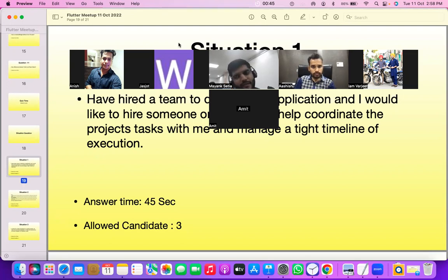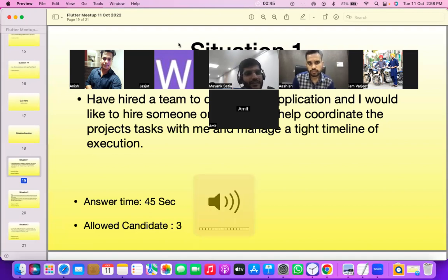But if developers are stuck on any task, they have to wait one or two whole days. In case the developer is stuck somewhere, or not progressing, they should inform us. Or else, if we get to know about it a day later, that's why a 15 minute Scrum call is scheduled daily. We can say a stand-up meet. It's suggested as 15 minutes, but if you go into a Scrum call every day, it gets extended up to an hour also.